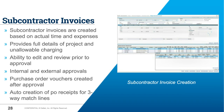Once you've finalized the invoice, you'll have an internal approval. You can print it out and email it directly to your subcontractor vendor to get their approval before processing further. This is a very important piece because one of the main challenges in managing a subcontractor vendor is the reconciliation between their employee charging time in your system and in their system. If there are discrepancies, it creates accounts payable problems. This process gives you more control — you generate the invoice, say here's what we have and what we're willing to pay for, and work out any issues before it ever reaches accounts payable.